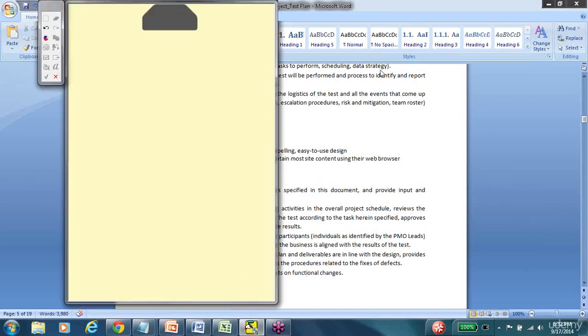So what this means is, let's say I have decided that I'm going to start testing on June 1st, as I said earlier. Now, is this a decision that the QA team can make alone? By June 1st, we have estimated that we'll be done with 100% test case writing and 100% of the test plan document. But can we get started with QA just because we are ready from our end? No, because QA is a reactive job. We will always have to be in line and in sync with the other teams, especially the development team.